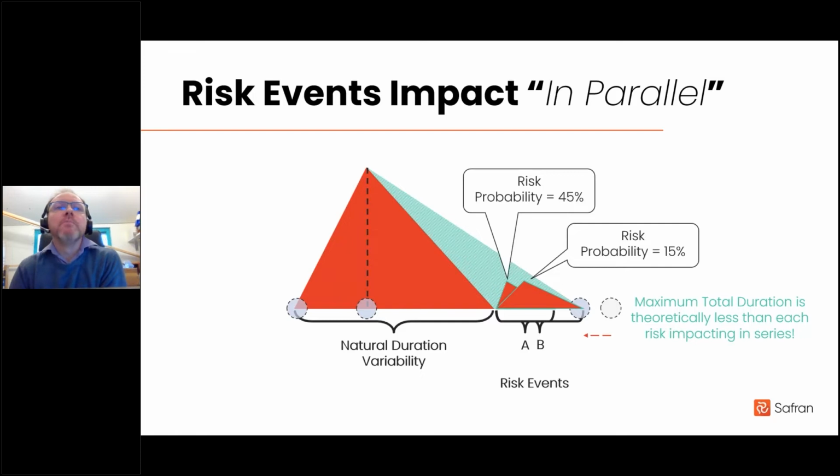Now, this is just modeling theory. So a seasoned analyst would recognize the importance of selecting the correct behavior that they need to see in their project risk model. And they'd spend quite a lot of time checking and changing these settings as appropriate. Now, in my experience on civil engineering projects, risk events do tend to occur in parallel, not in series. So being able to manually select a default preference for all new mappings is going to be quite a big time saver for you, being able to set that as a default now.